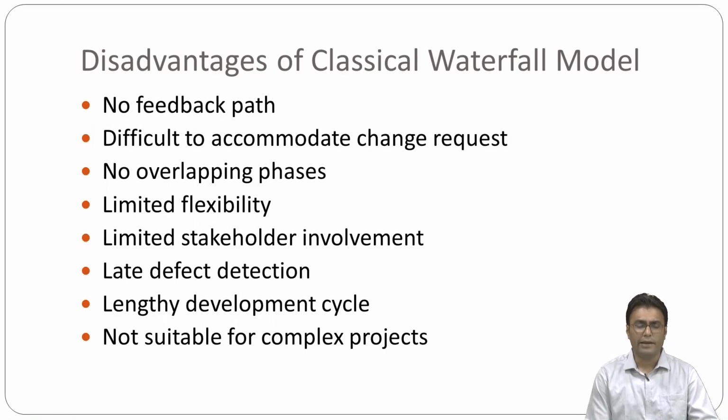Then we have lengthy development cycle. Now the waterfall model can result in a lengthy development cycle, as each phase must be completed before moving on to the next phase. So this can result in delays and increase the costs if requirements change or new issues arise. Then next one is not suitable for complex projects.